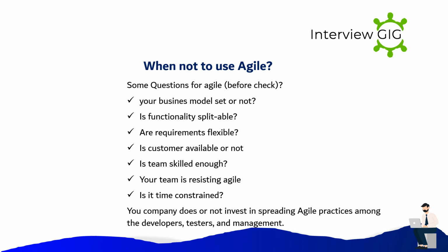When not to use Agile. Some questions to ask before checking for Agile. Is your business model set or not? Is functionality splittable? Are requirements flexible? Is the customer available or not? Is the team skilled enough? Is your team resisting Agile? Is it time constrained? Does your company invest in spreading Agile practices among the developers, testers, and management?